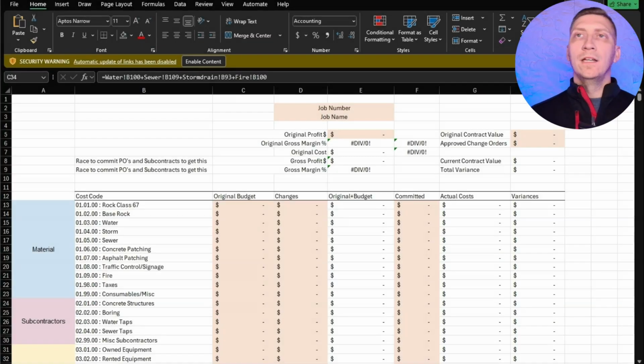The other aspect is your equipment. So that comes into your dailies. Sometimes that'll be lumped into your software for your job costing, but we need to know, with owned equipment especially, which truck, which piece of equipment is on which job, which day, how much are we going to charge per day? And then it just becomes a line item. We just say, hey, this truck costs us $38 a day. Put it over here. Put it here. That's kind of how we break through it.